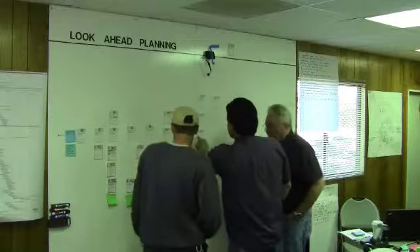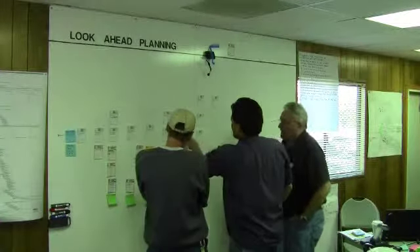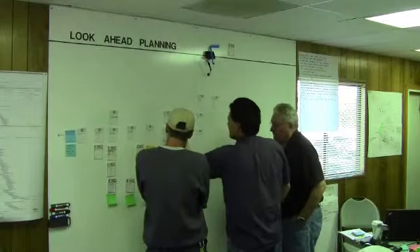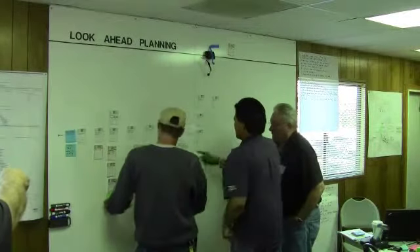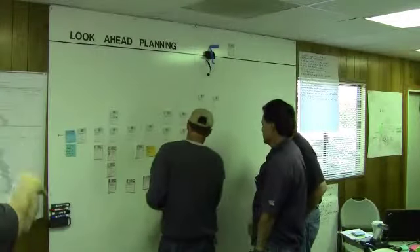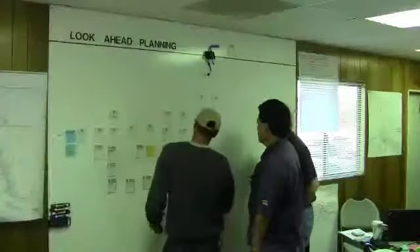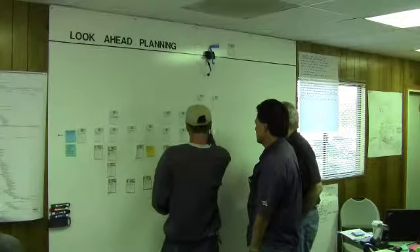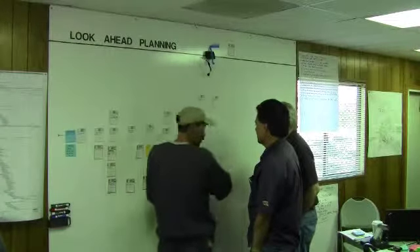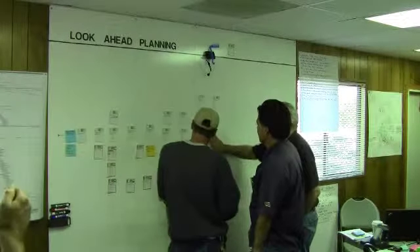All this is just framing, basically. He needs to be right in here. He needs all this to be done in all these units before you do it. So it's probably starting from right here. I'm coming in ideally after the third floor is framed so I can run my line sets all the way to the roof and don't have to weld them at every floor. After the third floor is framed. Yeah. And we're working on the second floor.